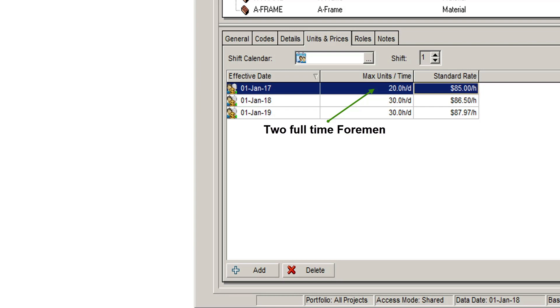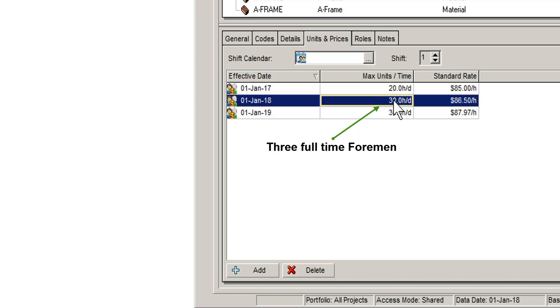We know this because we have 20 hours per day of foreman time available to us. In 2018, the number goes up to 30 hours per day, meaning there will be three site foremen available going forward from 2018.